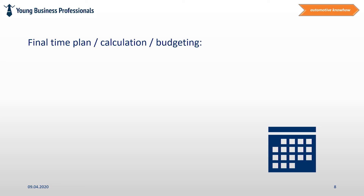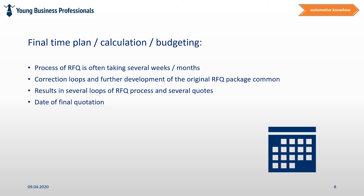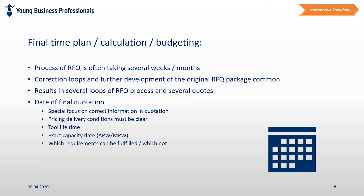Final time plan calculation and budgeting. The RFQ process often takes several weeks or months. Pretty often customers are still implementing new requirements that need to be reflected and evaluated. All that leads to several loops of the processes described before. Finally, this results in a final quotation in which all information will be summarized and provided to the customer. In the final quotation, the following information is very important: pricing and delivery conditions must be clear, the tool life should be mentioned as well as the exit capacity date and the average volume per week. It should also be clearly stated which requirements can be fulfilled and which cannot.